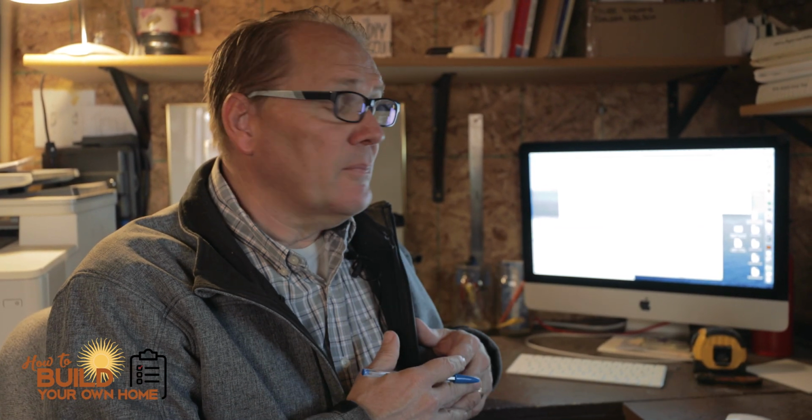When it comes to selecting a bid to put in your budget, and this is where all your work takes place, you spend some time at the computer, working with an Excel spreadsheet, which I offer with my program for free when you purchase the mentoring program. But you spend a lot of time looking at the budget, looking at the bids as they come in. The biggest problem that a lot of owner builders make, and I talked about this a little bit in my prior post, is that they take the lowest bid on everything and they work that into their budget. The problem with that is that you have absolutely no flexibility at all. You have no wiggle room, no opportunities to improve or to make adjustments into your budget.